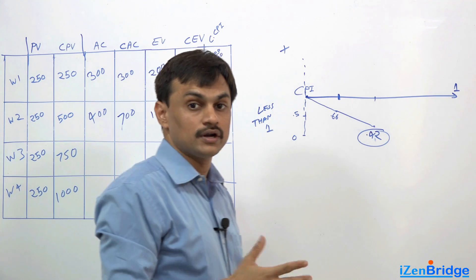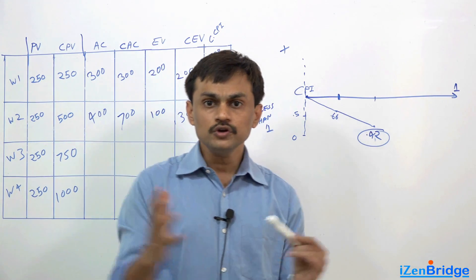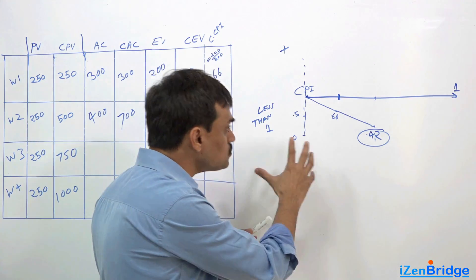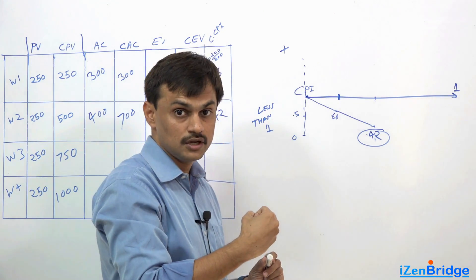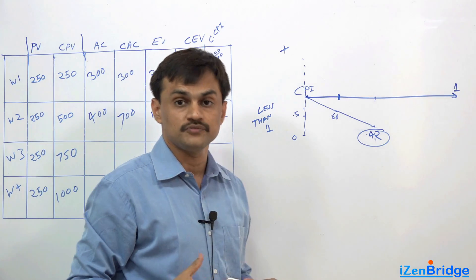This is our current rate of working. Now you need to figure out what performance you should achieve as far as cost performance index is concerned, so that you meet your project objective.